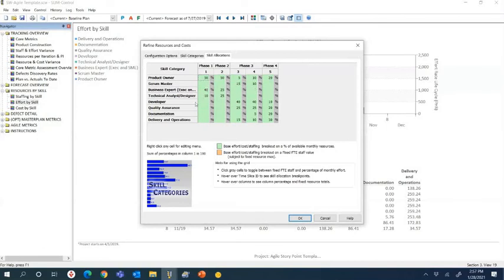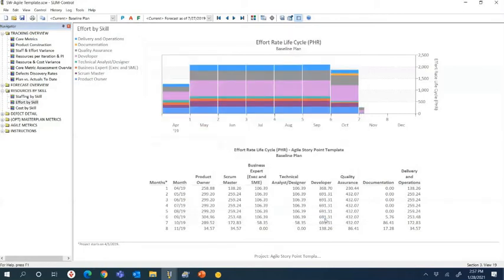These are percentages. For example, typically in this example, more money is spent early in the project on the management decisions and some of the analysis up front, and as we get into development, phase 3 and documentation, more is spent towards the end of the project, right? So this can be tailored for you. You can use the QSM templates, or you can create your own. But this enables us to break out that high-level estimate into more detail for you as well.